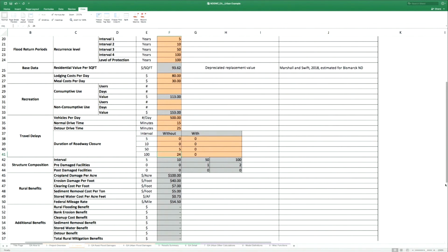Then you can't see in the dark, and somebody trips and falls down the stairs, and either they're trapped or they suffer a significant injury and end up dying. So it's an indirect effect related to floods, not directly related to the flood. That's part of the reason why, under some of those flood studies we were looking at, like with FEMA on the East Coast, we didn't count those losses, because of the indirect nature of the flooding.